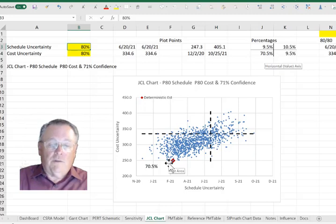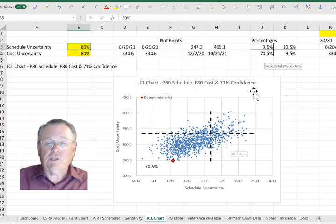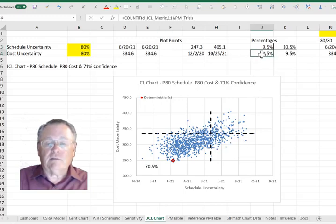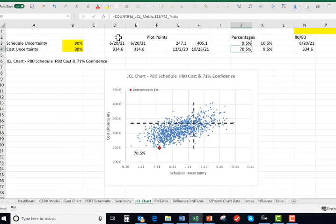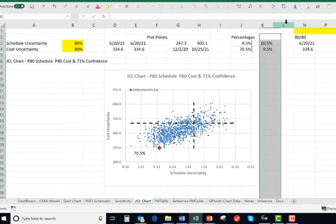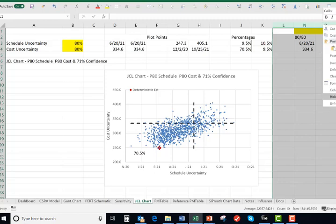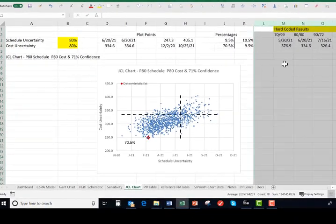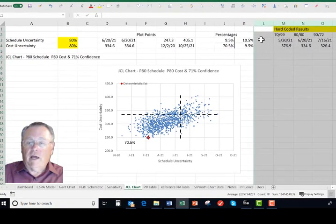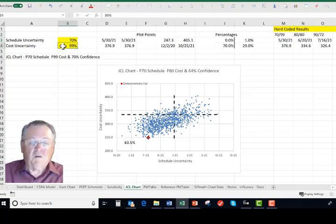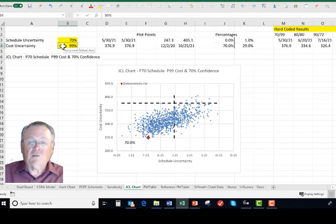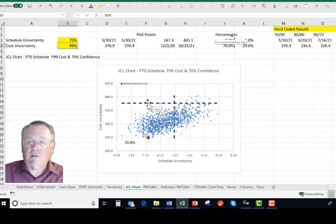Now we can do one more thing with this graphic, and that is, we can think about is there more than one way of achieving a 70% confidence level. So here I've hard coded this 80/80 and the date and the cost. And I've recorded some other options. So we could look at 70.99. This also has 70% confidence, but now I've really had to increase my cost. That may be more than I really want to commit to this project or budget. So now I want to reduce that.